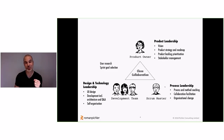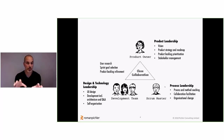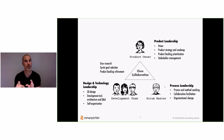There are also a few shared responsibilities. User research, selecting a sprint goal and agreeing on it, and refining the product backlog — in my mind these are responsibilities shared between the product owner and the development team, and truly fall under the idea of close collaboration and doing things together. Working on the product backlog should be a joint effort. The intention here was to tease out what the core responsibilities are and what kind of leadership each role has. The product owner is really about product — not project, not exclusively product backlog, not looking after the team, not worrying about the development process.